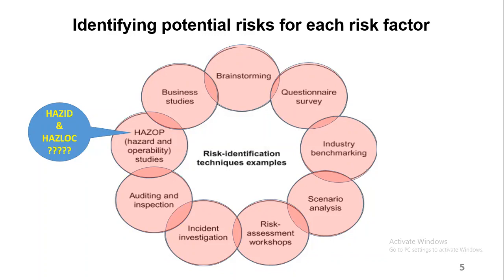And so now, in terms of the action plan that they draw up, it's also based on those risks, on those zones. And they even put up control measures. They will put up something like, let's say in SX, they will tell you that not anyone can enter SX without doing an induction. You must be fully aware of the risks and hazards in that plant. And it is the same case with, let's say, the furnace. They will teach you things like you must not pour water into the furnace. It will result in an explosion and all those things. So that forms part of their risk register.